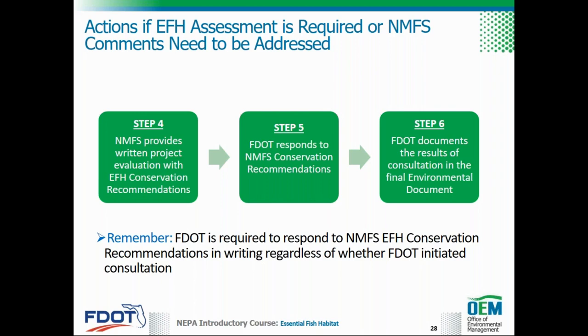If NMFS receives information regarding an FDOT project that may adversely affect EFH and FDOT has not initiated EFH consultation, then NMFS may inform FDOT of the Magnuson-Stevens Act requirement to consult and ask FDOT to initiate EFH consultation. FDOT is not required to agree with NMFS's request. However, NMFS is required by the Magnuson-Stevens Act to provide EFH conservation recommendations, and FDOT is required to respond to these recommendations in writing, regardless of whether FDOT initiated consultation.